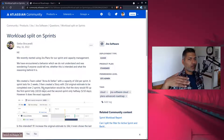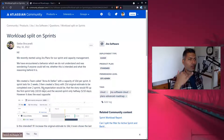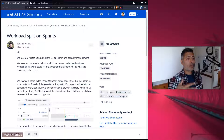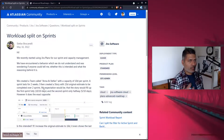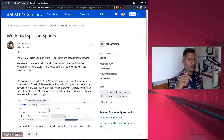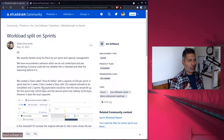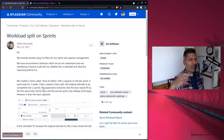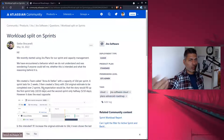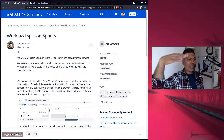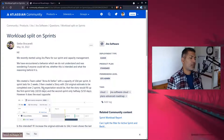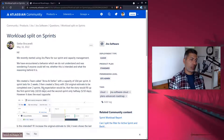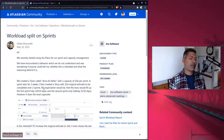In Jira, we have three levels natively within Jira Software: epic, story, and subtask. Epic is linked to story using epic link, and stories are linked to subtasks using a child relationship. But above epic, items like features are connected using a parent link. Anything above epic is basically using the parent link, and this is what is used in Jira to build hierarchies.